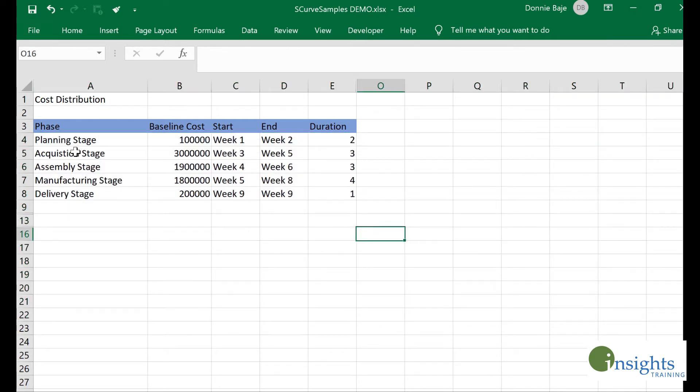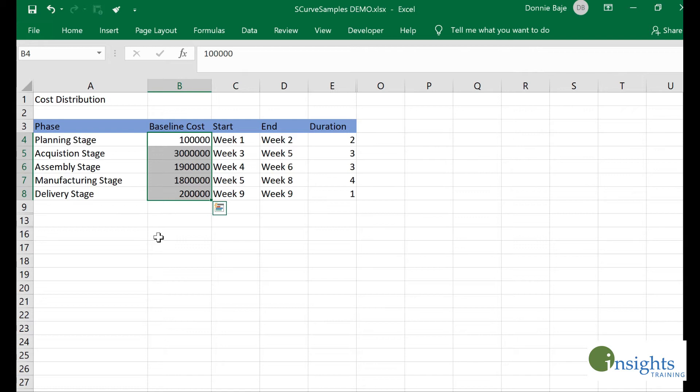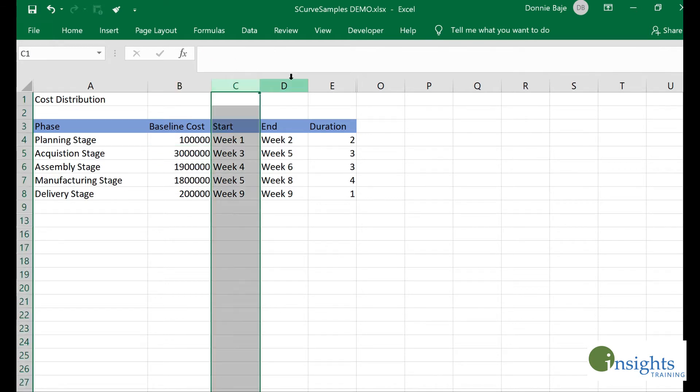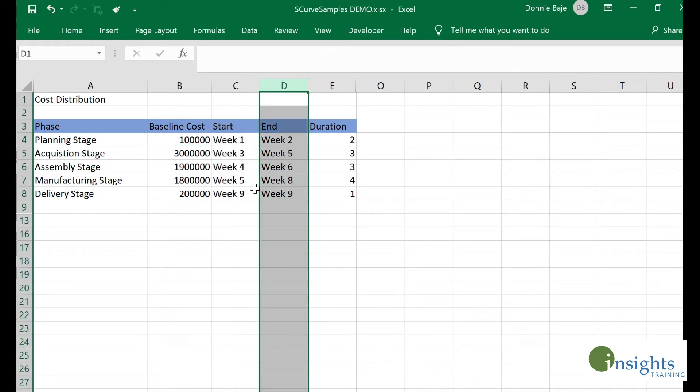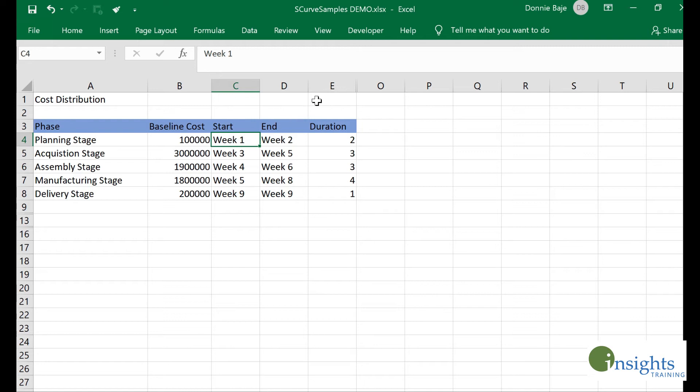We have the planning stage, the acquisition stage, assembly, manufacturing, and delivery. This is my projection of how the cost will be utilized on each of the stages. This is up to the project manager on how they will plot the total costs on each stage. Next, you need a start and end column showing the duration of the stages, and this optional duration column.